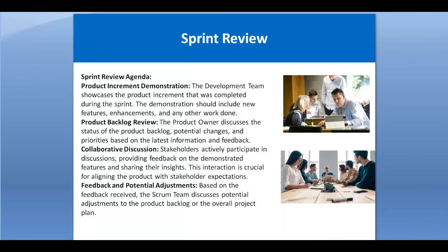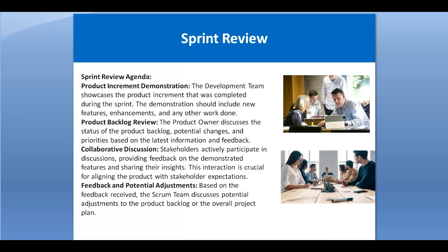Sprint review agenda. First thing is the product increment demonstration. That means the Scrum development team showcases the work which has been completed during the sprint, and this demonstration should include new features, enhancements, and other work done. So whatever work has been completed in the sprint is showcased by the development team to the stakeholders, especially to the customer and the product owner.